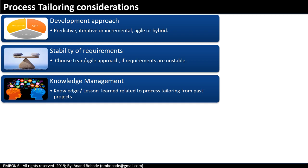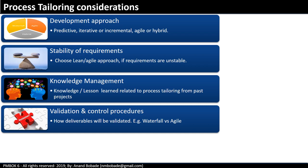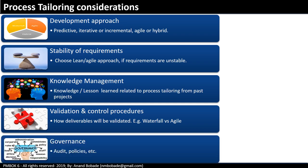Knowledge management: if a project is a repeat project where the organization has already executed similar projects, then knowledge and requirement management will help the project manager with related systems and their possible reuse. Validation and control procedures: there will be different procedures based on the selected project approach — for example, the business acceptance process will be tailored based on whether waterfall or agile is chosen. Governance: governance mechanisms like audit policies may lead to tailoring some processes — for example, in government projects, governance might be very strict and 100% adherence to policies may be mandatory.